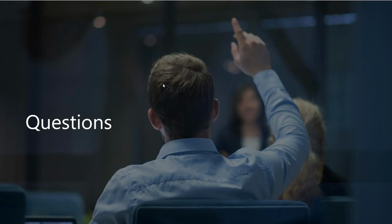This is Wallace. So, even though we haven't shown that, what we do on the project side is we create a project type, and we essentially set it to not be capitalizable, not to be billable, and we don't enable any kind of burdening. And then what happens is we build and provide a work breakdown structure for the project to be as detailed or the very minimum with one task. That way, on the supply chain side, when they want to stripe by project or isolate and do everything that Mehmet was showing that he did before, they still have that capability.